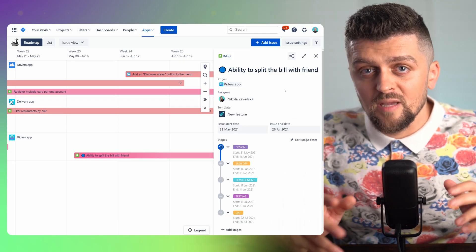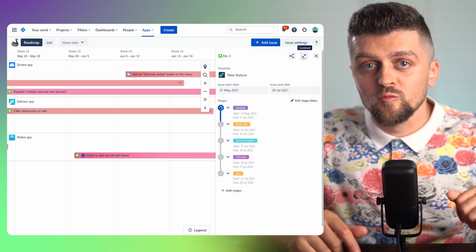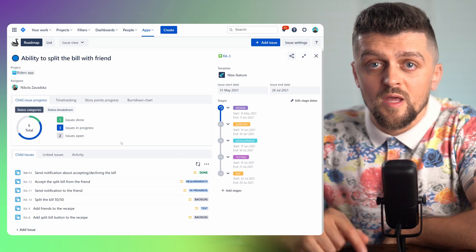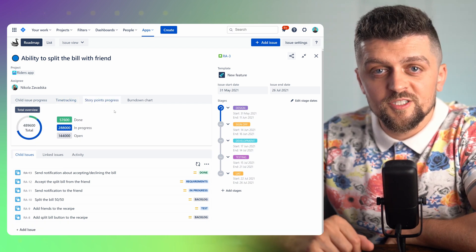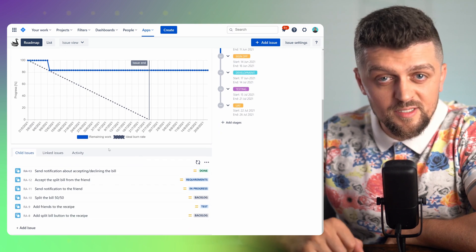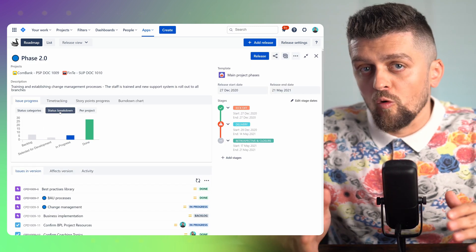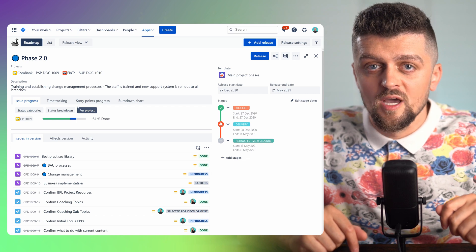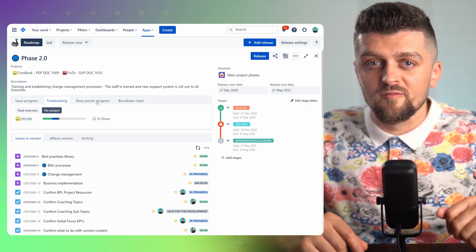When diving into the details, you get a genuine sense of awareness from the reporting panel, whether it's a release, epic, or task report. With each deliverable broken down into smaller tasks, you'll have aggregated reporting available — you can see how the work scope is advancing, understand time spent, story points achieved, and visualize progress using the burndown chart. And because more than one team often works on a release, or you need to include tasks from multiple projects, we added the ability to create cross-project releases with all of this reporting available for shared scope.